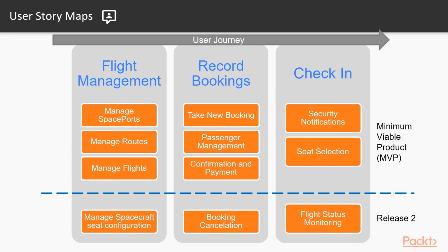But also notice on this storyboard we've got a level here, above which is the minimum viable product, and the MVP is something that is used very strategically in an agile project to stop us trying to gold plate, as it's often called, our solution. We're trying to create the absolute minimum functionality in order to achieve the key objectives of our users so that we can learn from that process and solicit feedback from those users, which will then influence our subsequent development.